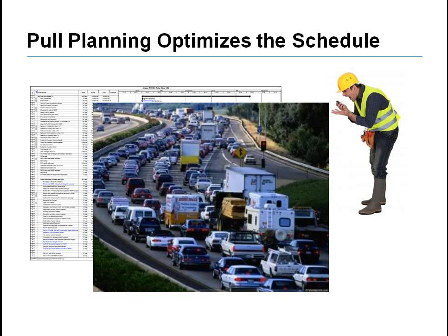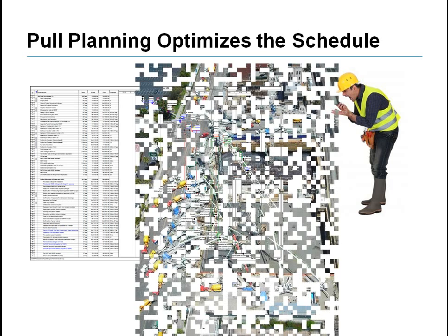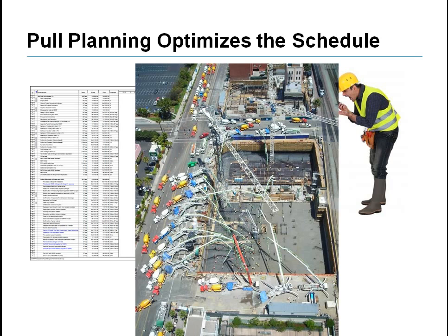The concept of pull is not that unfamiliar to us. Grocery stores operate on a pull basis by restocking shelves only as needed, not by a master scheduler. On construction projects, we already use a pull-like approach on time-sensitive activities such as pouring concrete. We only bring the mud to the job when the forms are set. Pushing the loaded trucks to the site any sooner would result in an expensive waste of unused material and a lot of extra work to chip out the drums.